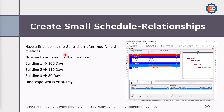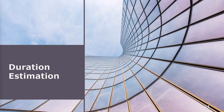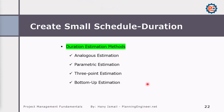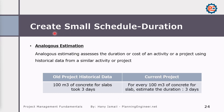Now we need to modify the durations to give every building a logical duration. But before doing that, let's talk about duration estimation. We have several methods according to project management science. The first is analogous estimation, which assesses the duration of an activity or project using historical data from similar activities. For example, historical data says 100 cubic meters of concrete for slabs took three days — so in our new project, for every 100 cubic meters we put three days.